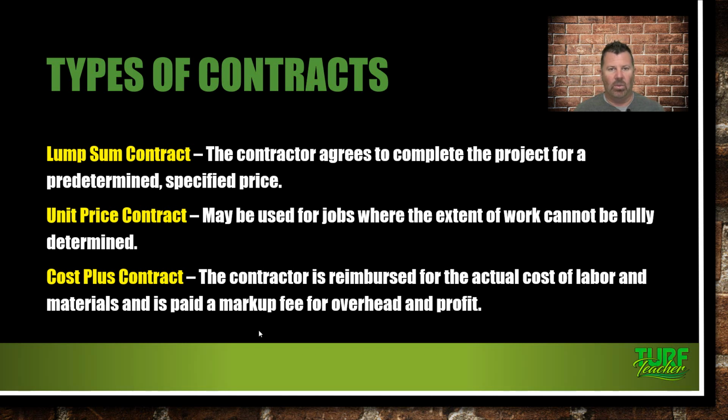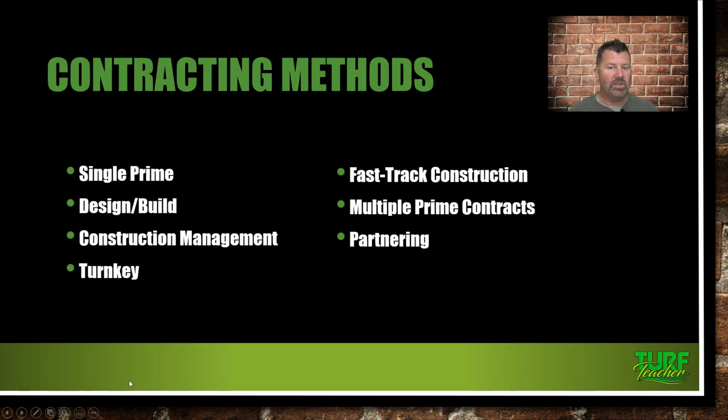It is a cost plus contract because the homeowners are changing their mind so many times they can't actually give that lump sum price or they would lose the money. And that actually helps the homeowner make a quick decision like, whoa, well, this is cost plus. That's going to be an additional $5,000 to switch countertops now. So it kind of keeps it where it was at because they don't want to spend the money.